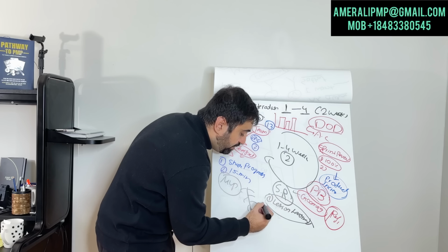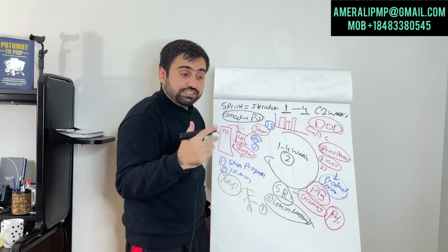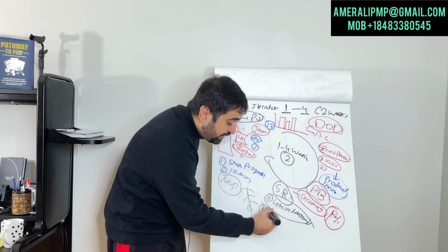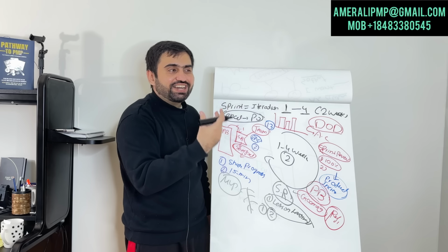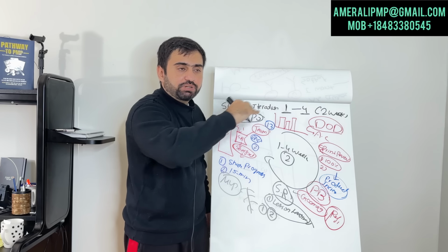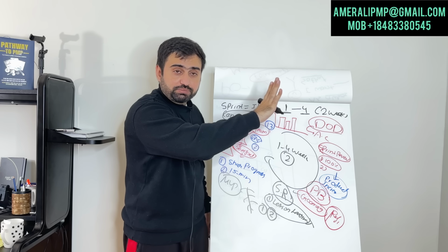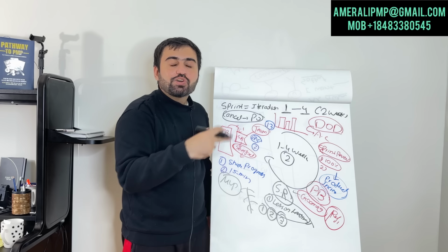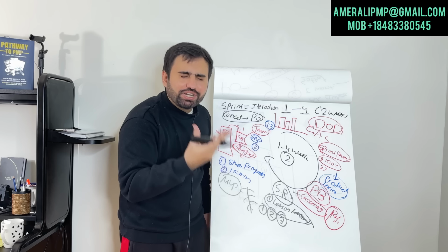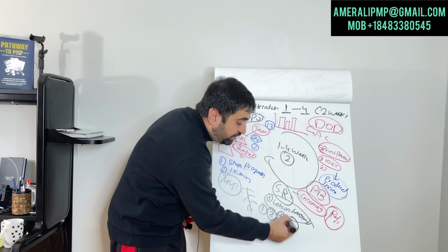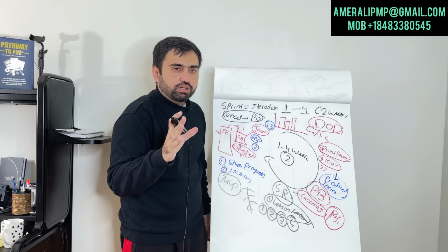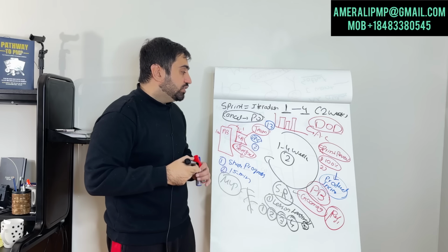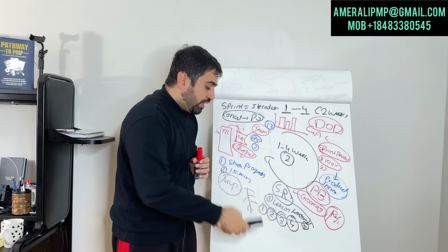It's 5 steps. Step number 1, set the stage. We set the stage, like what we are going to do. Second, we gather data. What happened in the entire sprint. We gather the entire data and put it on something. Third, very important, generate insight. This is where we do the root cause analysis and identify what can be improved. Then we decide 1 or 2 improvements, not more, put them in the sprint backlog or product backlog, and close the retrospective. So this is the entire Scrum for you.